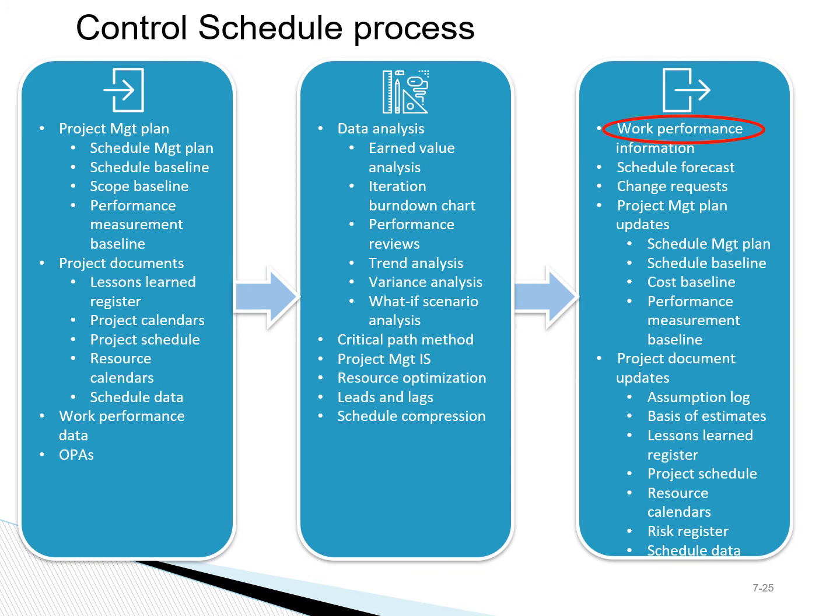Like other PM processes, schedule needs to be controlled. One of the key tools for controlling schedule is reviewing the work performed of resources and adjusting as real performance information becomes available. And if that's different from our estimates, then we need to adjust our resources or reallocate our resources. So that's part of the control activity.